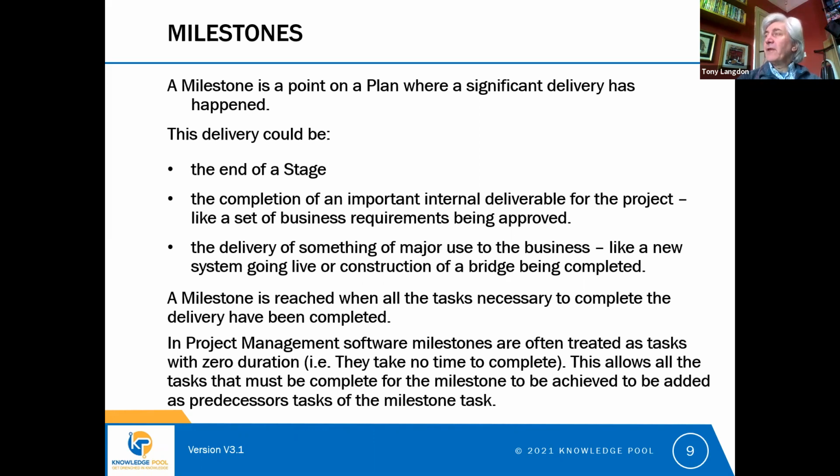And I think it probably would be. I think whoever is paying for the bridge, assuming that it's a very major bridge, is going to want to know that all the design problems have been worked out. We know that we can build a bridge that is going to be safe, that's going to be affordable, that's going to carry the load we need to carry. So that's quite an achievement. And one of the reasons that we often set milestones is to prompt us to communicate with stakeholders, to say the project has achieved something, we've got to a certain stage.